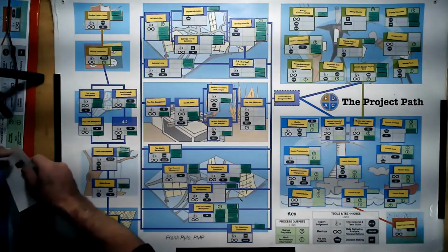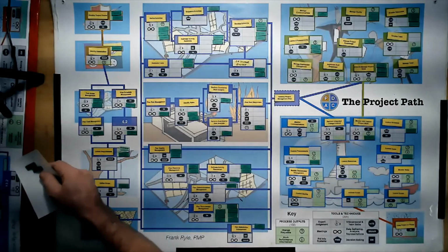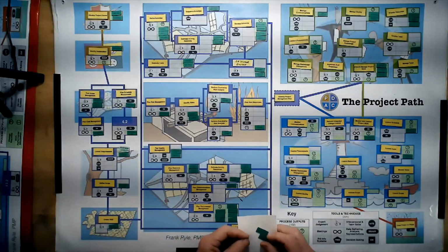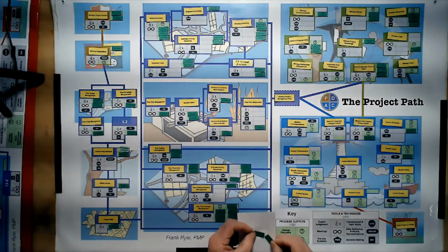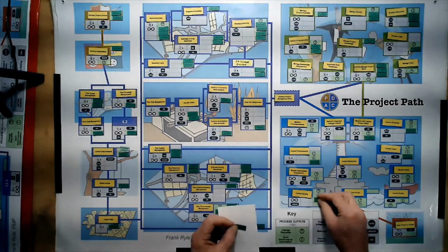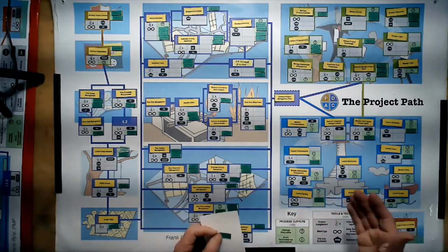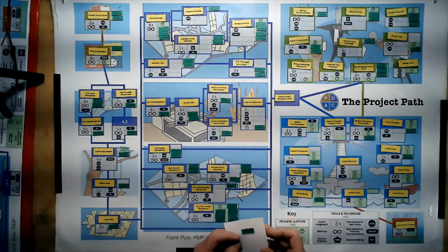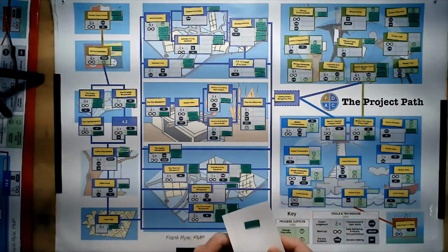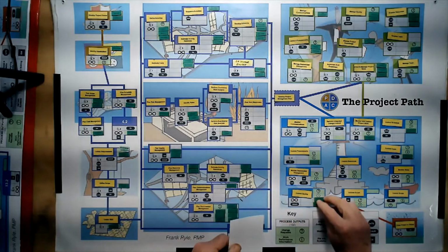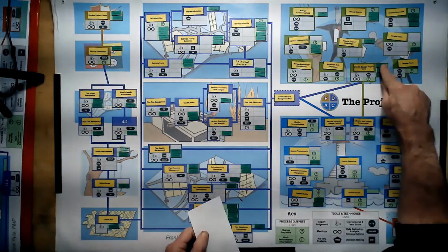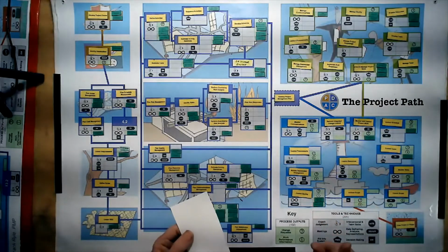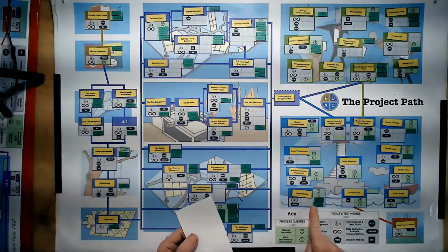Now, interesting ones here, we have this idea of quality, control quality. Obviously, control quality will give us a couple of deliverables. You can see it there. The first one is going to be the quality control measurements. What are the measurements that we're getting out of the testing and the inspections that we're doing? But the primary one is called verified deliverables. Verified deliverables are things that were delivered here, and then they are checked, tested, inspected, and then verified as being correct, and not being complete, but being correct.